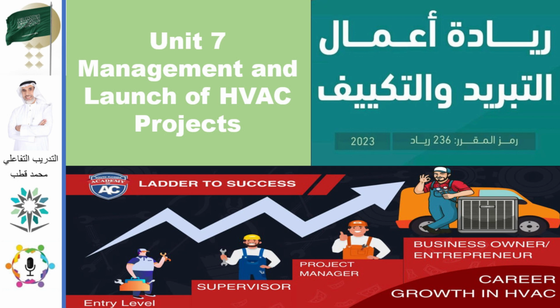First, just list all the tasks, everything, big, small, government procedures, hiring, leasing, marketing prep, all of it. Brain dump everything first. Then what? How do you organize that list? Good question. Then you arrange and prioritize those tasks. Some things have to happen before others, right? Like getting your commercial registration probably needs to happen before you legally hire employees. There's a logical sequence. Dependencies.